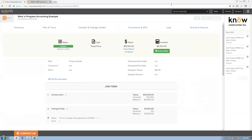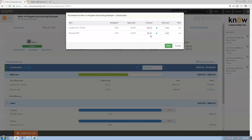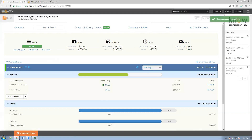They also want to compare materials estimated to materials received — we actually do have a place where you can mark materials as received as part of our purchase order management. We show you in real time on the project: here are my numbers — how many have been approved to be purchased, how many have been ordered, and how many are received. The idea is that looking at the plan and track section should show you the full financial breakdown of what's happening in this project, so I don't need to run around to different corners of Knowify.